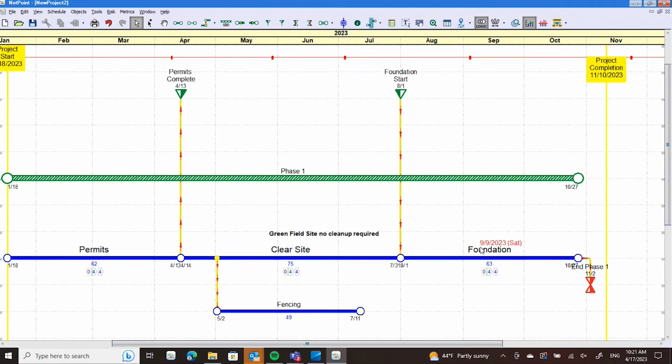So this can also be helpful if you're building a schedule with different trades involved. Each trade appreciates having their particular trade identified by color, and that way they can see in the schedule where they're picking up work, where it's handed off, that kind of thing.